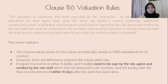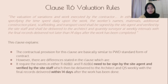Next, Clause 11.6 - Valuation Rules. This clause explains that the contractual provisions are basically similar to PWD's standard form. However, there are differences in that events under Clauses 11.6D1 and 11.6D2 need to be signed by the site agent and verified by site staff, then delivered to the architect and QS weekly, with the final records delivered within 14 days after the work has been done.